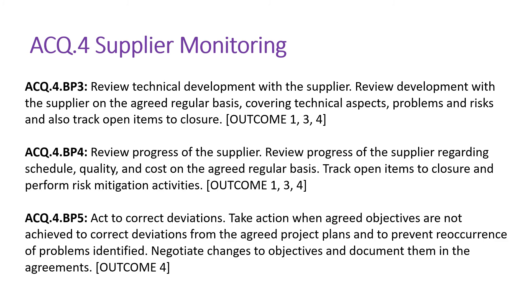Best Practice 3 talks about reviewing technical development with the supplier. This is called a joint review. Review development with the supplier on an agreed regular basis, covering technical aspects, problems and risks, and also tracking open items to closure. Some projects do this activity on a daily basis, some weekly twice, weekly once, or fortnightly — based on the criticality of the project. In most cases it will be daily once or weekly once.